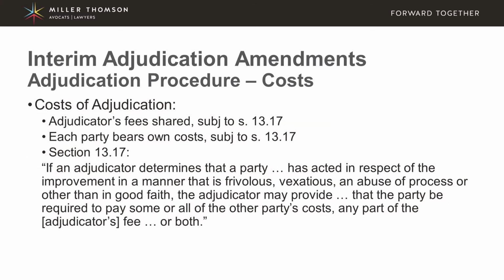Now, with respect to the adjudication procedure, of course, we have to consider the costs aspect. So the adjudicator's fees will be shared between the parties equally, subject to section 13.17, which we'll discuss very shortly. Each party to the adjudication has to pay for their own legal costs, again, subject to this section 13.17. Now, section 13.17 is very interesting, and it has some serious implications.